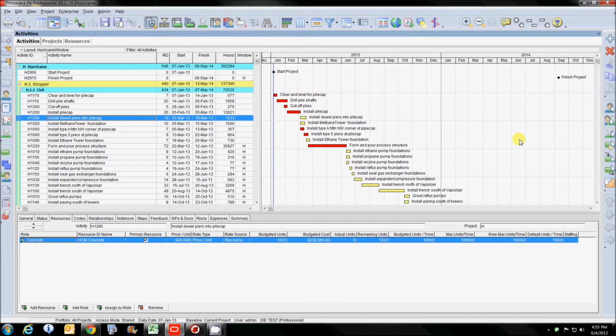Okay, this is where it starts. This is our P6 schedule. And we have to do 2 things in here in order for it to work in PertMaster. We're doing it here because we have a lot of activities that are going to be affected by our window. Otherwise, you could do it on an activity-by-activity basis within PertMaster, but this is how I do it when I have a fairly large schedule. This particular schedule is only 200 activities, but it was more or less specially constructed to illustrate the impact or lack of impact of a hurricane.